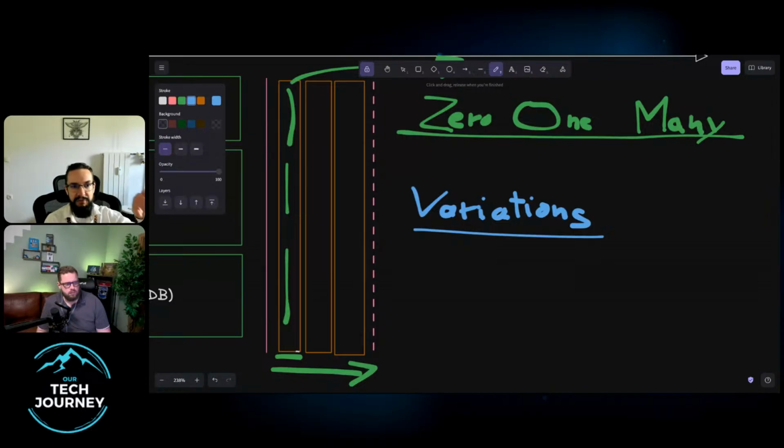But everybody sort of has VAT. Even if VAT is being masqueraded as GST, or other taxes or sales tax, it is still conceptually the same number of moving parts, but there are variations in semantics. But it's not like an insurance form where, depending on one decision, you get forced down a completely different workflow. So when you're experiencing variations, one of the best strategies for splitting up work vertically is to say, we're going to do full path to production on one variation, and then we're going to do full path to production on the second variation.